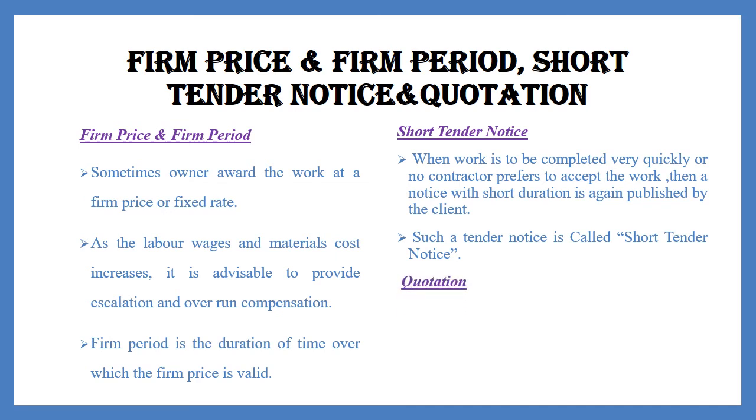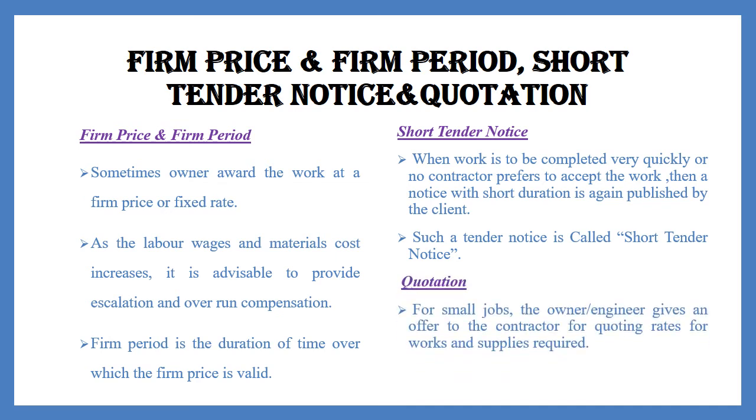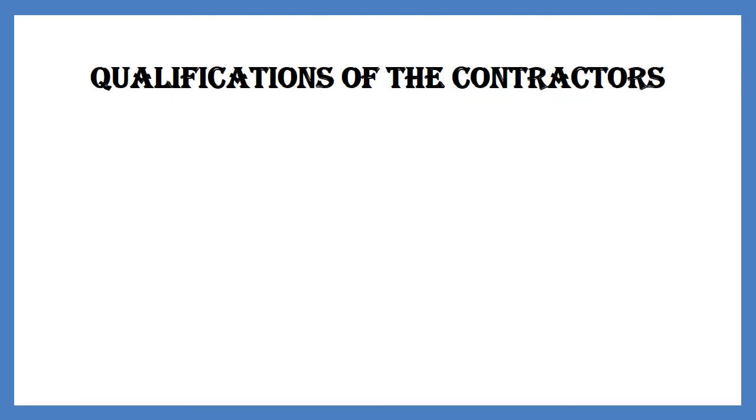Now, what is quotation? For small jobs, the owner or the engineer gives an offer to the contractor for quoting rates for the works and supplies required. No EMD is required for this type of quotation.